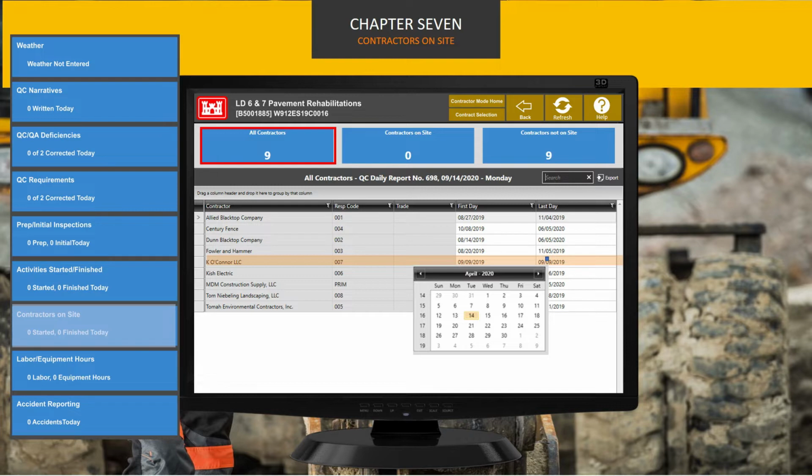If you select a date other than the date of the report you are preparing, the subcontractor's presence will be reported on the corresponding daily report. If that daily report has already been completed and submitted, the report that the government has will not reflect this information. To update the report, ask your USACE representative to return it to you for corrections. Make the correction, sign, and resend.